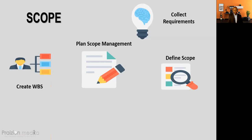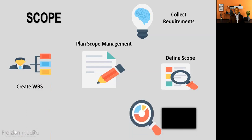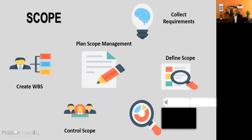Create WBS is where we create the work breakdown structure. Just Google it, you'll see what it looks like. It looks like a family tree, but it's decomposing work to lower levels. The next one that we have here is actually validate scope. You don't see it, but it's validating scope. How is that done? The customer inspects the deliverable to validate the project scope. The last thing that we do in scope management is called control scope. So this one right here that is hidden is known as validate scope. And validate scope is where the stakeholders, the customer, the sponsor ensures that that product, service, or result is fit for use and conforms to requirements.